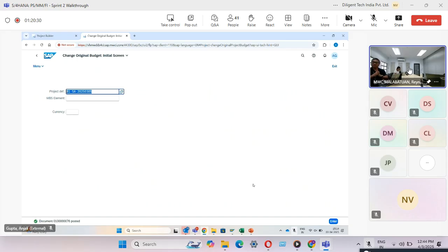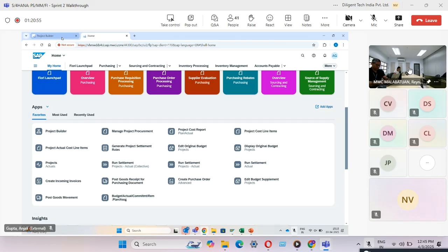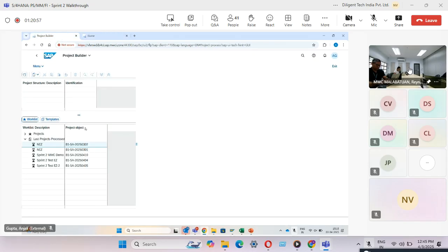When you request the supplement budget, the approval process will use the OneApp app, where you can request the supplement budget and it will be approved. And once it is approved, you can assign the supplement budget using similar applications. Going back to my